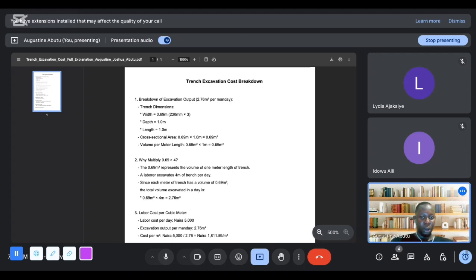You know that when you're on site and you pay the unskilled laborers to start working, majority of them will tell you that they don't have a digger. Some of them come to site with their digger, some don't. Some will come with their shovel, some don't have a shovel. So your 5% of small tools covers for digger and shovel. Okay, so that's the explanation of small tools.